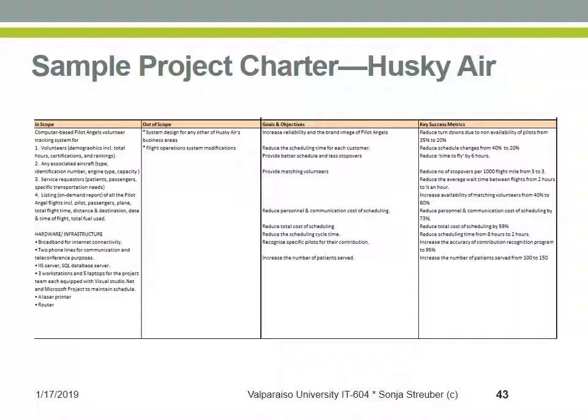This also means that in order to be as specific as possible, we're including not just the in-scope part, but we're also talking about what is out of scope. Because as soon as we list items that are out of scope, that is expressly not included in our final project delivery, will we be able to fill any kinds of gaps that we may have left in the in-scope section. Being as precise as possible in these 2 sections will prevent something called scope creep later down the road